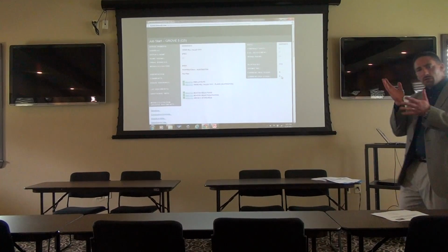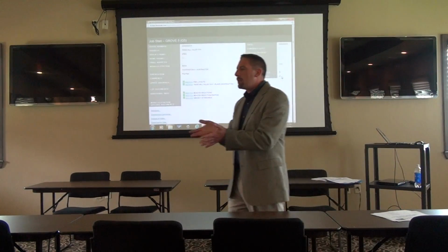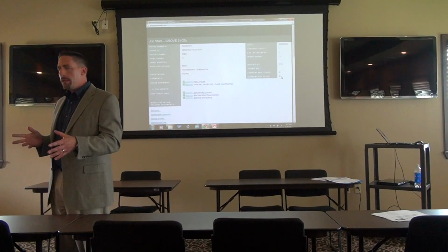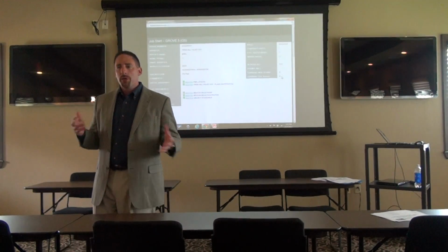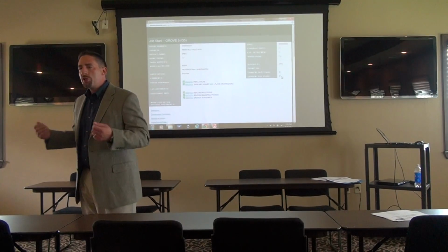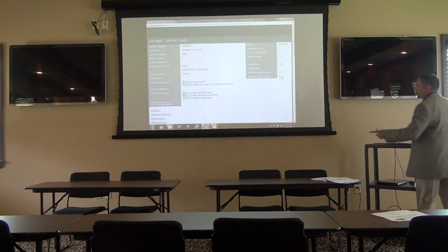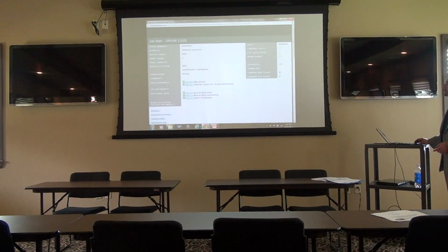On that chart, it's going to align what trades get released when, what triggers these things, what construction activity triggers a release. And that's how we're going to have to figure out what your order lead time is going to be. When we get that chart, we'll let everybody know what the stages are. But the job documents here are showing you the current stage this house is at.